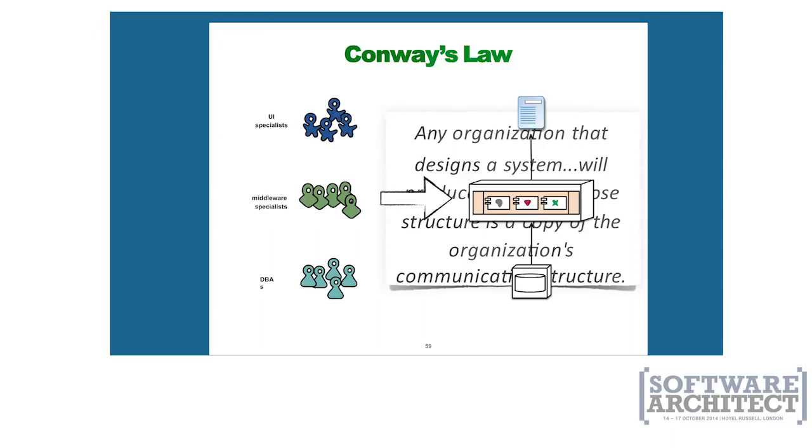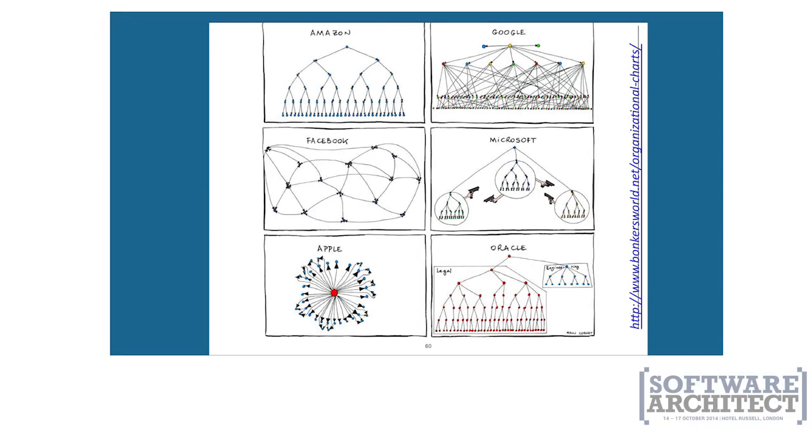And so Amazon a few years ago read that and really took it to heart and created this concept that they call 2 pizza teams. No team in Amazon is larger than can be fed with 2 large pizzas. So from a practical standpoint, it's 12-person maximum. But to do that, they had to create these really cross-functional teams. So every team has an operations person, has business analysts, and has a product owner, it has developers. Everything required to manage and operationalize that service is part of it.